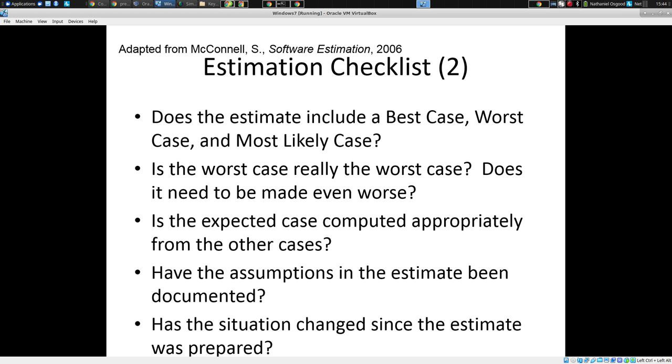And a range, together with most likely, will give a sense that maybe it's really asymmetric. There's some cases you're worried about. Most likely, we can do it in 3 weeks, but it may take 3 months. And it gets the discussion going in a constructive way. What does it take to lower that uncertainty, to lower that risk? What will you need in order to be more confident?